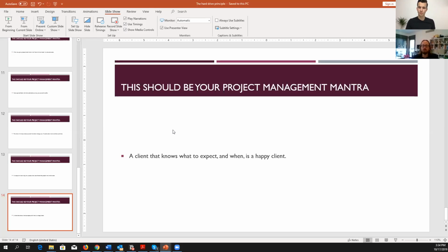For instance, if you're using Trello, there is this Chrome extension called Elegant that just takes your tasks and organizes them in a beautiful Gantt for the client to follow. And if you need to update the duration, it automatically updates the Gantt. And the client is just able to go with you hand in hand while you are conducting the project. And all the answers are answered even before he asks you. It's there on the Gantt. Yeah.